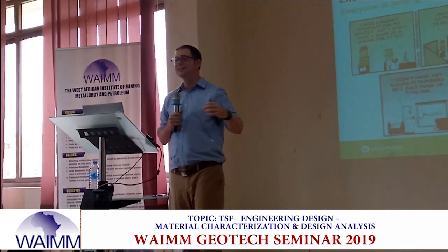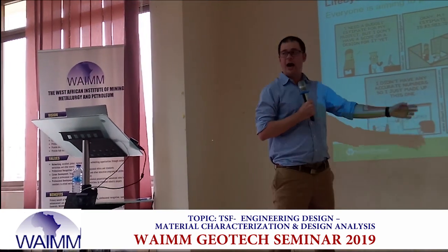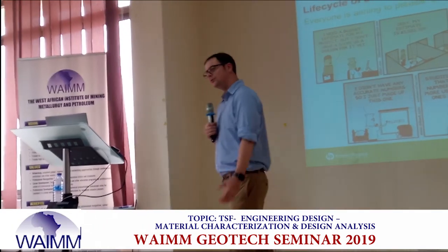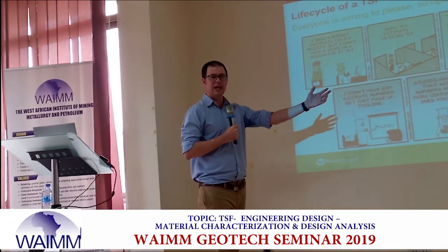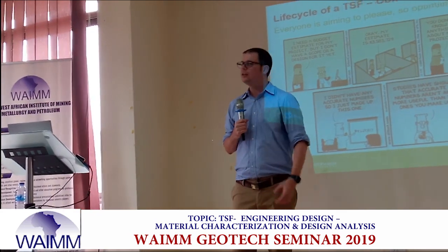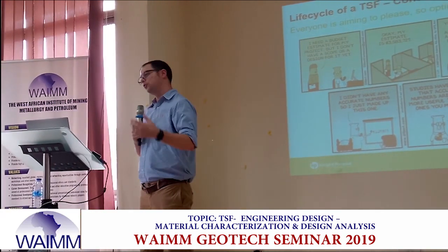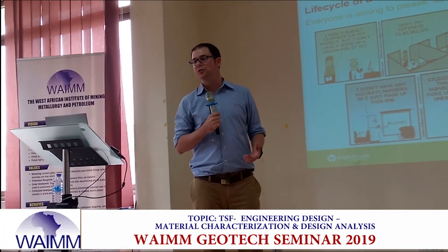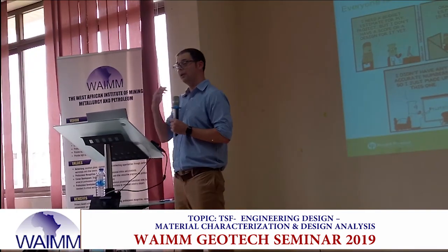But we find ourselves in these situations all the time. Right? Somebody comes and says, how much for my site investigation? Well, where's your site? Where's your site investigation? What's going to be built there? How much for my tailings dam? There's some rules of thumb out there. About $1 a ton is a reasonable rule of thumb. But it shouldn't go into a cost estimate. It shouldn't go into an AFE. It shouldn't go into budgetary numbers for a big company. Right?